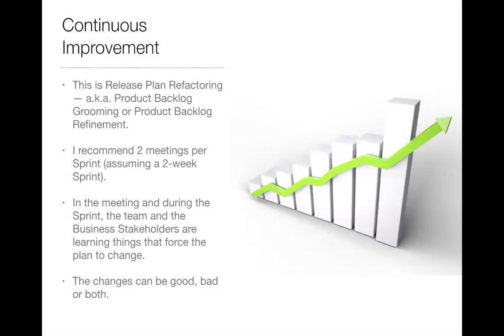Okay, so we must mention that we're going to be continuously improving this thing. So the main way we're doing that is what I call release plan refactoring, but the community calls it grooming and refinement. We're recommending 2 meetings per sprint. Again, we're assuming a 2-week sprint.